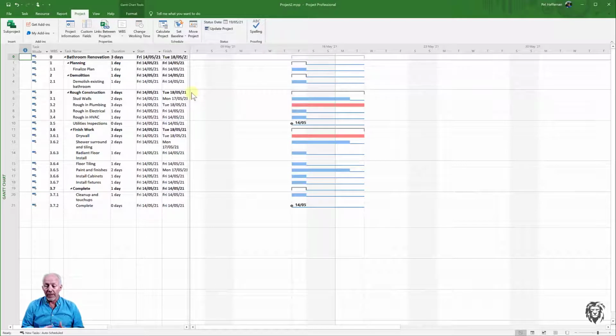Now, in project management, typically I would limit these to what I would call causal dependencies. You can't build a wall until you have a floor. So there's a physical constraint. It's not a scheduling choice. It's not, I want to schedule the wall for that week and I want to schedule the floor for this week. Those aren't the kind of dependencies that we should be doing here.